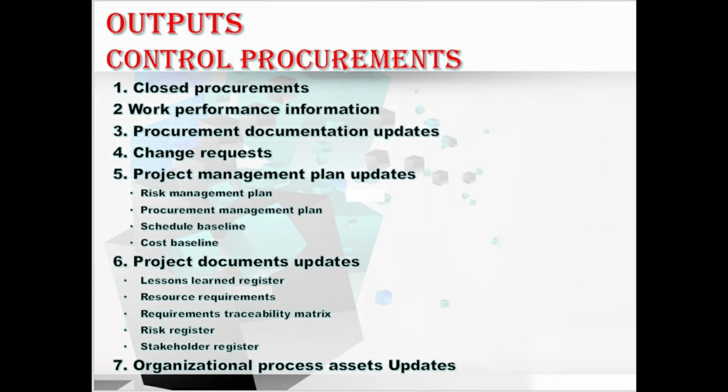In this output, the contracted and the material cost can change frequently during the delivery of the project. That is, these changes can occur because of fluctuating materials and labor prices created by the external economic environment, and that also needs to be incorporated into the cost baseline. This is about the cost baseline. Okay, hope you understood about this output also.